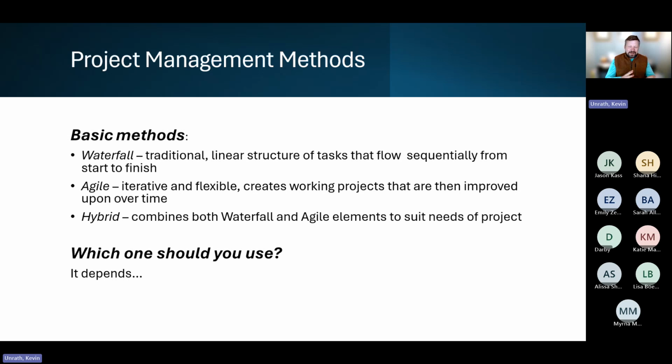So I'm not going to focus on that vocabulary of project management that's been created in the professional literature, but instead I'm going to talk about some of the methodologies that all of these various systems of project management share. And I'm really focused on a continuum of two, from more structured, which is what I'm calling the waterfall method, to less structured, or an agile method. So a waterfall methodology for project management is very linear, very sequential, follows a rigid structure where each phase of the project is completed before you move on to the next phase.